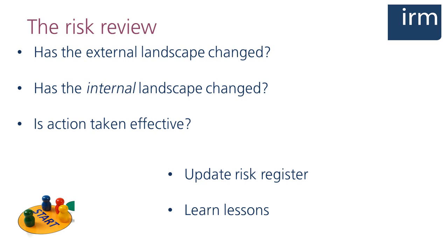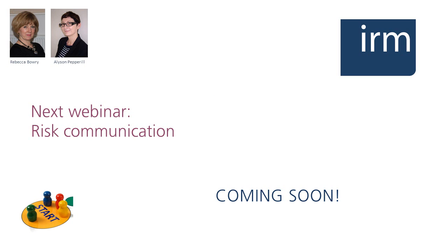And our final point on this is make sure you learn from any lessons. There may well be issues that would apply in the future for some pieces of work, so it's important to take on lessons learned. It goes back to Rebecca's example of the communication strategy, and an easy way to do this is to ask yourself and the team 2 questions. 1, what went well? 2, what could have gone better and why? Okay, that's probably 2.5 questions.